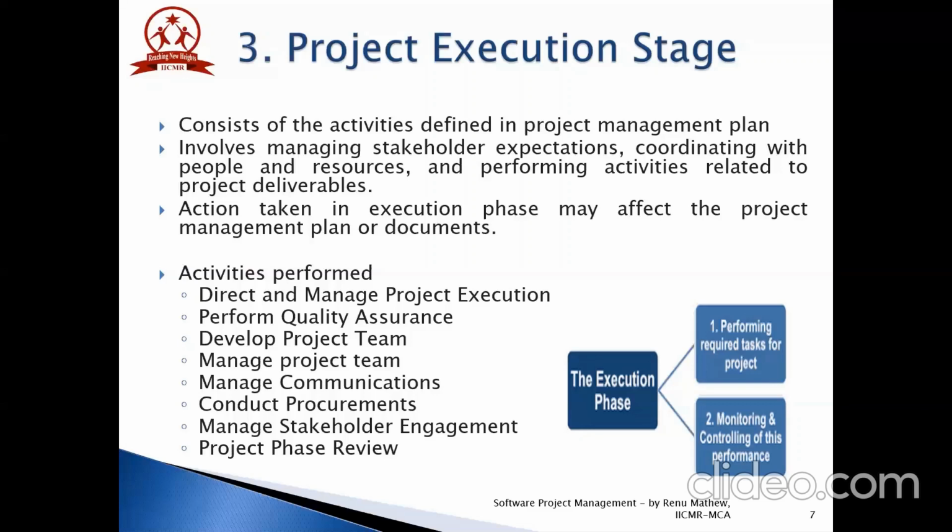There is always a need to manage communications. There are 3 main communication aspects that need to be monitored: project team members to the project manager, to the program manager, to stakeholders or other sponsors. The inputs of managing communications include communication management plan, work performance reports, enterprise environmental factors, and organizational process assets. The outputs of this stage would be project communications, project management plan updates, project document updates, and organizational process assets updates.